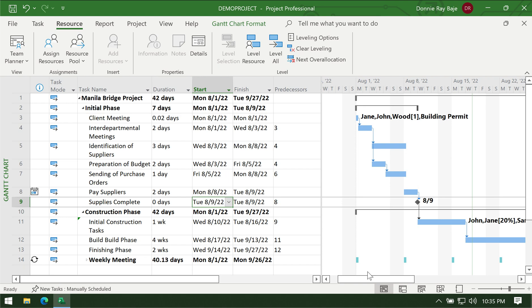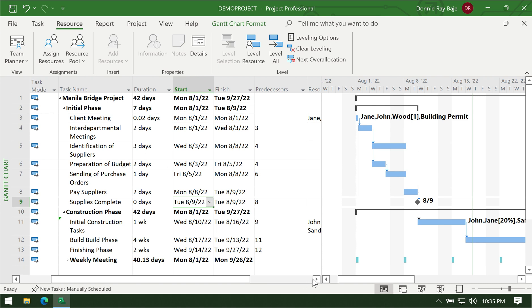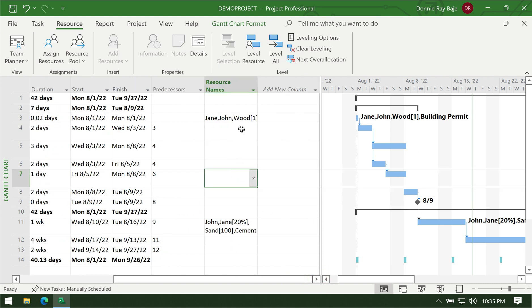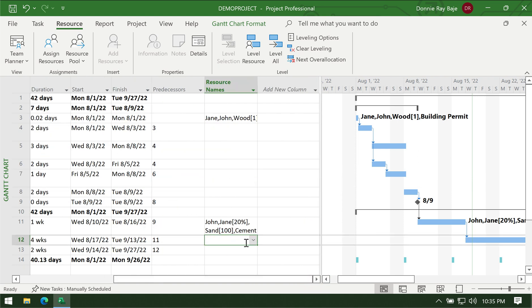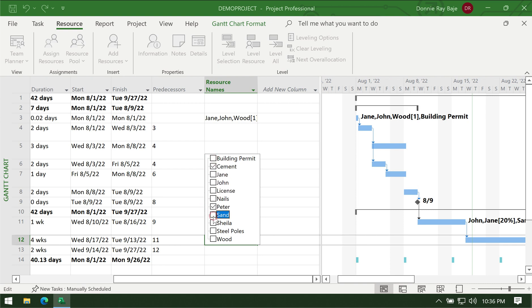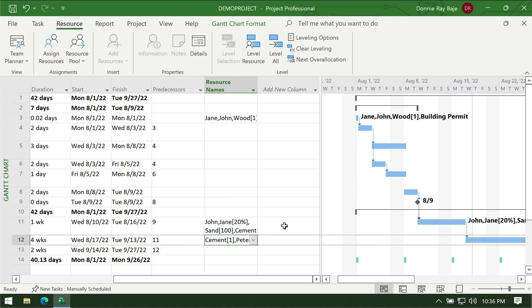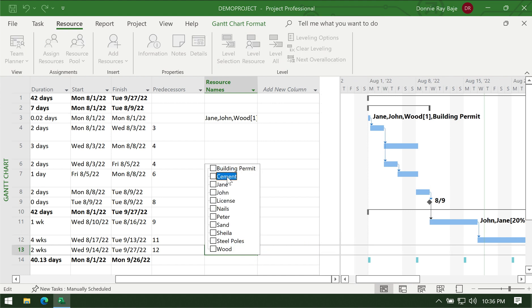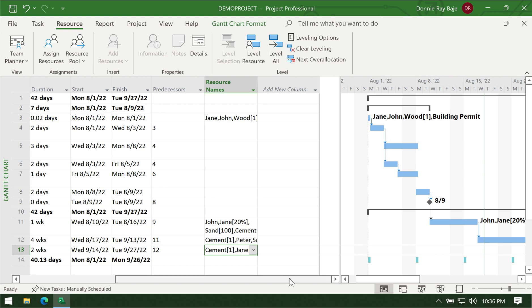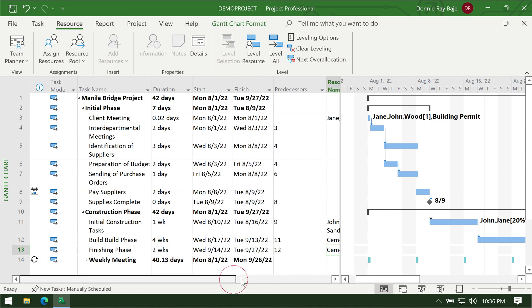The second way of assigning resources to tasks is to scroll to the right and use the resource name column. Instead of going through the right-click menu, you can just go here, drop down from that column, and check the items or people you need to assign to this task. So we have cement, Jane, John, Peter, Sheila, and so on. That's how to assign resources using the second method.